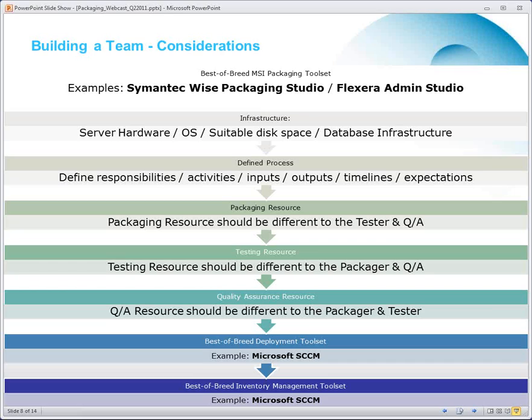Well, now, if you still have those 100 packages that we talked about that you want to prepare for Windows 7, let's say that just 10% of them need extra days. Let's say each of them only needs 5 days. Well, now we're talking 10 packages with an additional 5 days each. Over one packager, just for the problem packages, you're talking 50 days. You haven't even touched the rest of the 100. Right? Timelines and expectations, that's where it all comes out of.